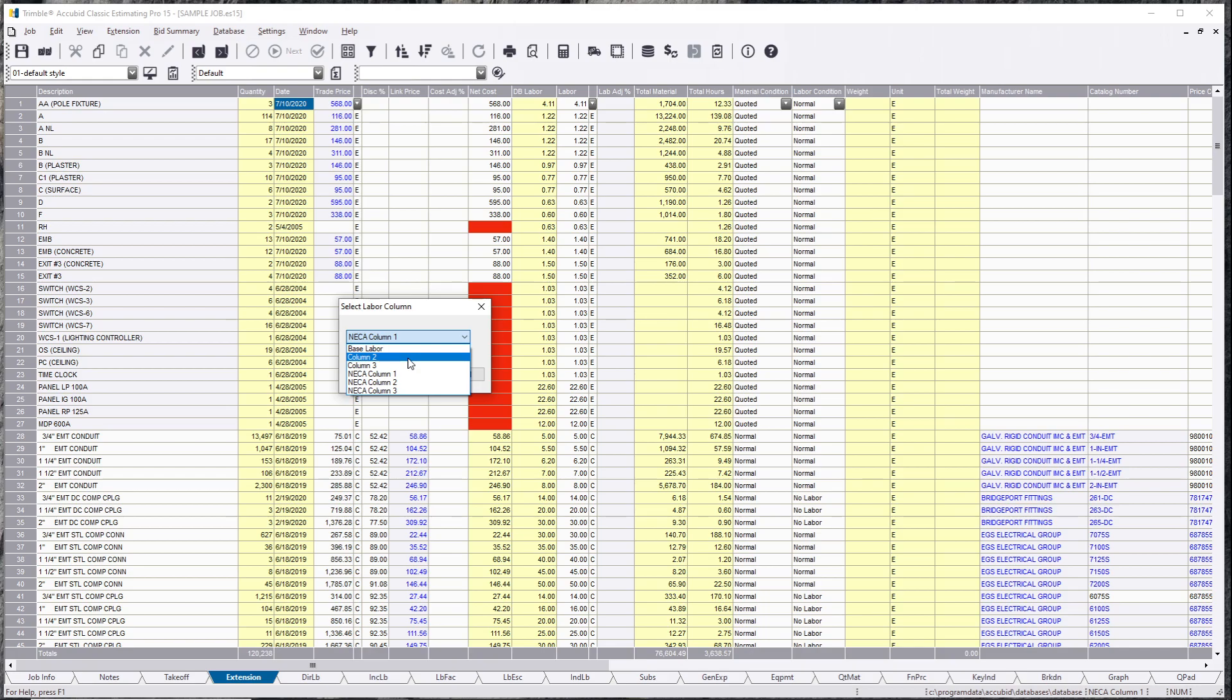NECA columns are not competitive, used for change orders and whatnot. You're allowed NECA column rates when you're doing your change orders, no discussion about it. You've got to make some kind of money on a job. We do competitive bidding rates to get our foot in the door and get the job. Our change order rates are always going to be different. Everybody needs to understand that we're all here to make money and we're not trying to rip everybody off. NECA column is change order only, base bid column 2 and column 3 is competitive bidding only.